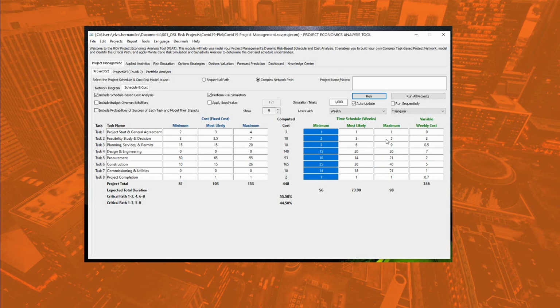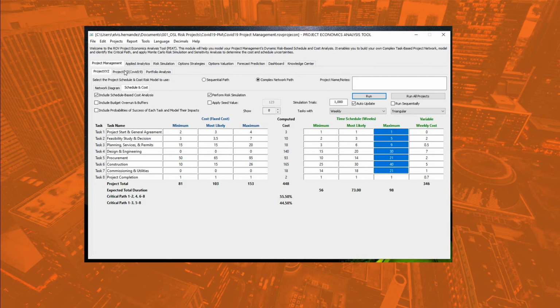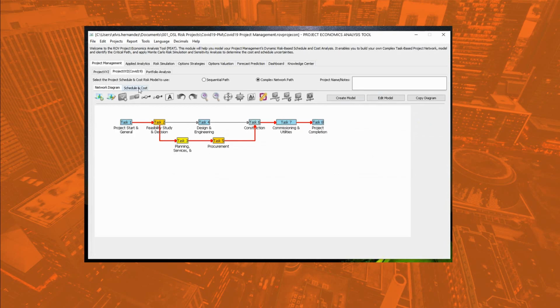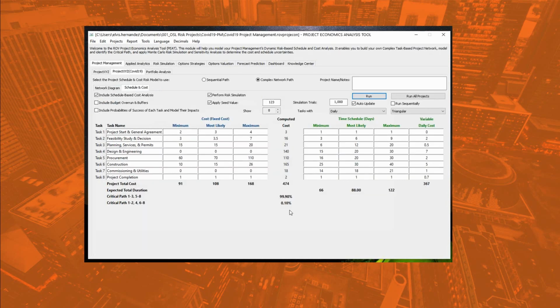If this number changes, same project, okay? This number changes, look at it. I change some of the numbers, okay? Because certain activities delay, other activities accelerate, which is the example of coronavirus. When I run the model again and start evaluating the uncertainty around this model, the critical path changes. Right now, with the new uncertainty, this is the likelihood of the critical path. So the critical path changes because the assumptions change, certain activities are completing, and so forth. That is dynamic.